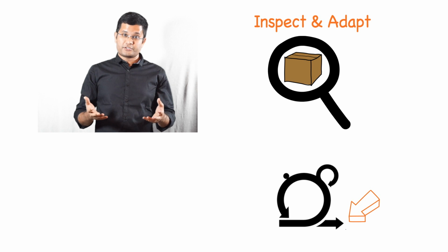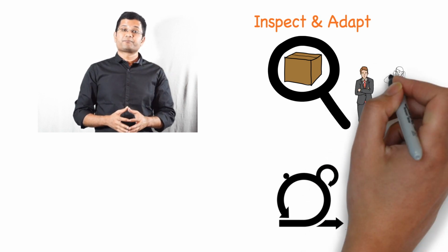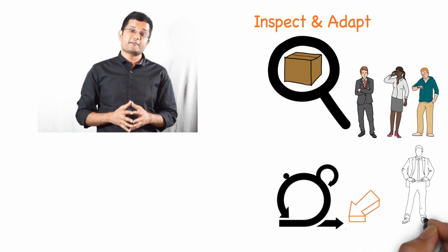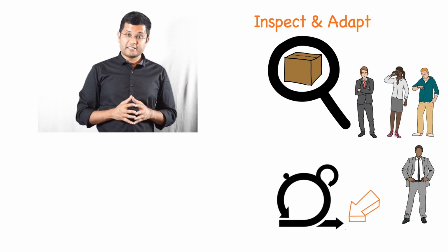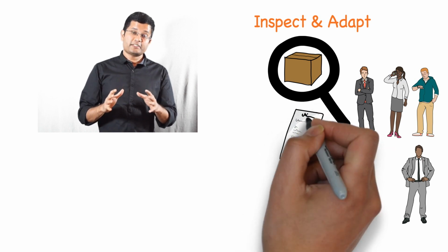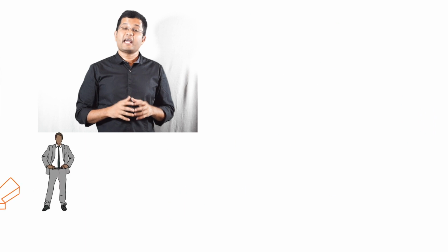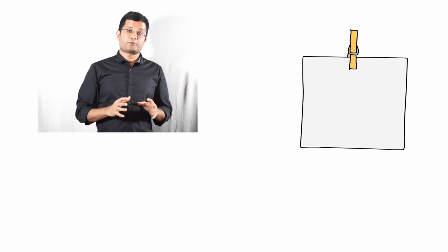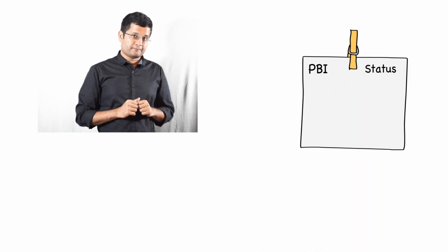The stakeholders could be the product owner, marketing team, customer, senior management, and anyone who can give constructive feedback on the products. In the meeting, you would identify one team member who would take notes of all the feedback that is being provided. And rather than spending time preparing presentations, you would project the tool through which you are tracking the PBIs.